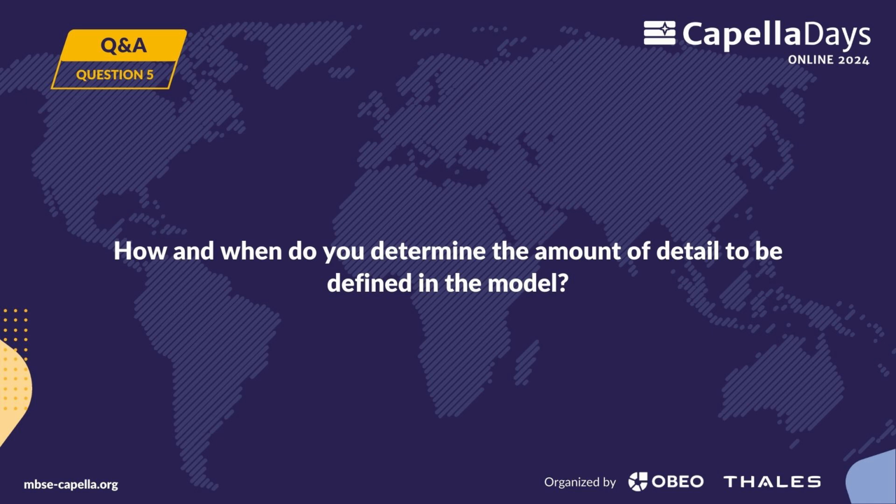What is the exact amount of detail is set by the stakeholders, and in this sense, the authorities. So in the end, the approach that I followed is I did the very minimum, and then by frequent interaction and unofficial exchanges with the authorities, I understood where they needed more information, where they did not, and that's it. So one has to start from the need rather than from what you think is the need that the stakeholders might have. You have to question the stakeholders.